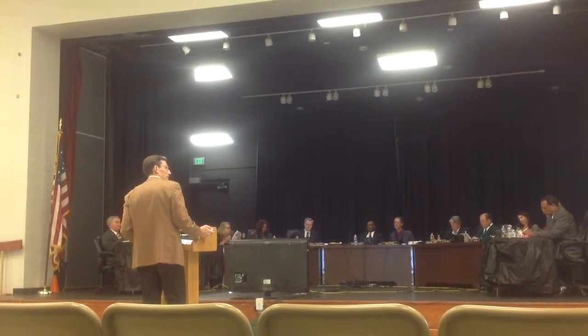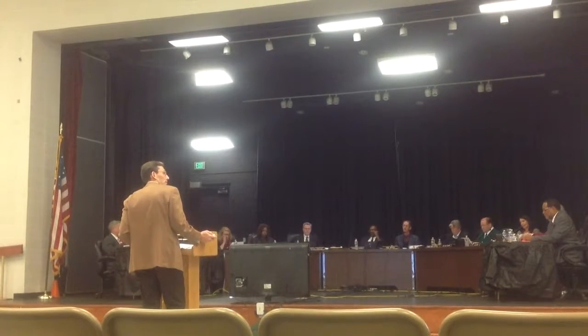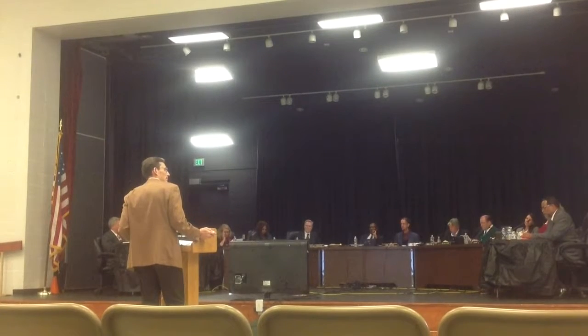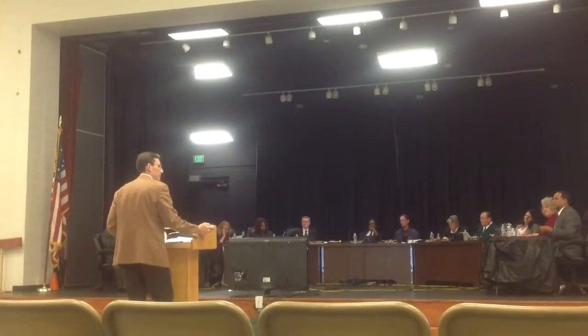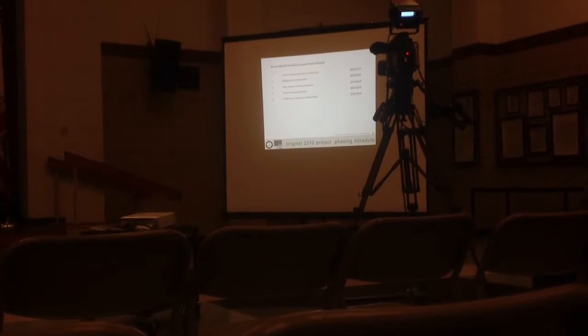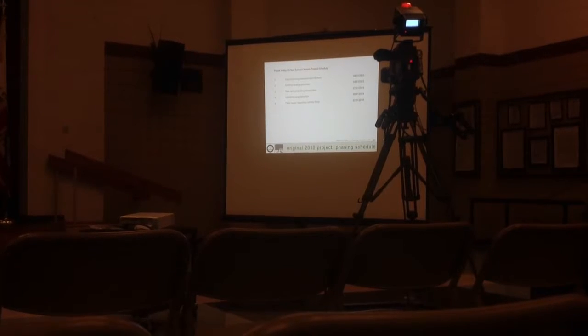So there are a couple other factors that come in. One of them is the project phasing. This is what your school used to look like. We then did the temporary housing, which is out there, and now we're in the process of starting the demolition of the campus, then ultimately the new construction, and finally we're going to end up with the beautiful brand new school. Well, why is this important? All these phases. When we started talking about this project back in 2010, we anticipated 5 phases, starting in roughly 2011 and finishing interim housing placement in 2013, and finishing the final project in about 2016. So just about a year and a half from now.